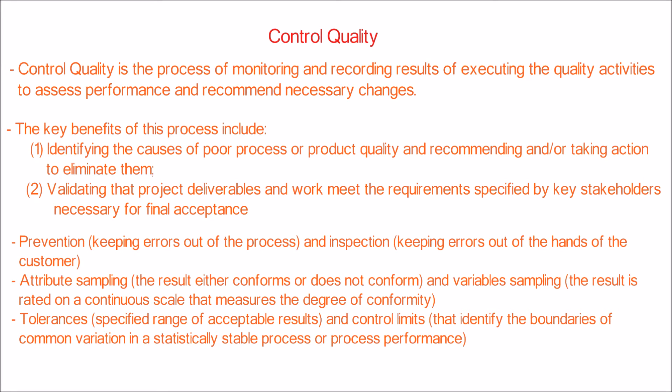Important terms that are widely used in control quality are tolerances, specified range of acceptable results, and control limits, that identify the boundaries of common variation in a statistically stable process or process performance.